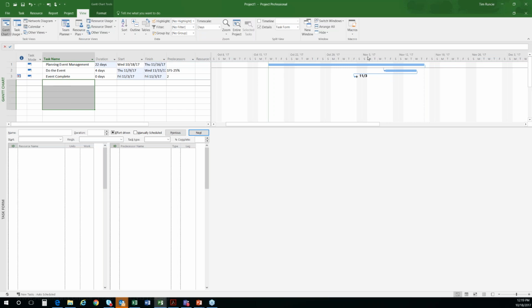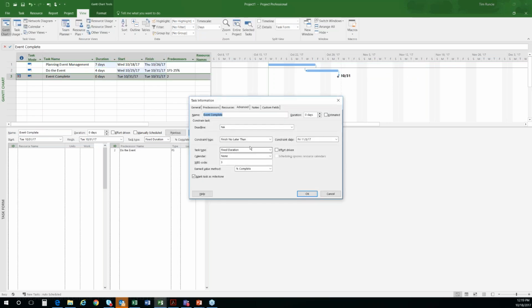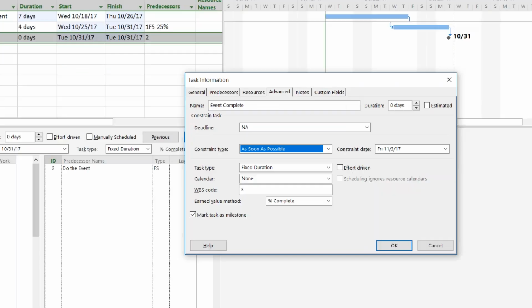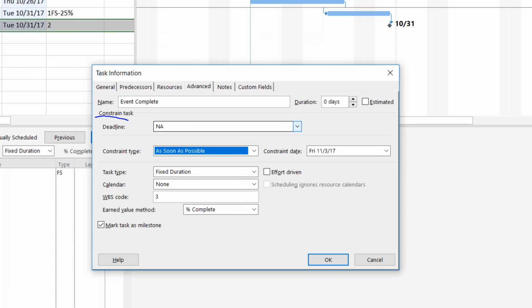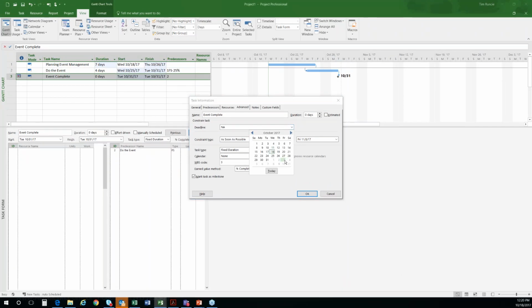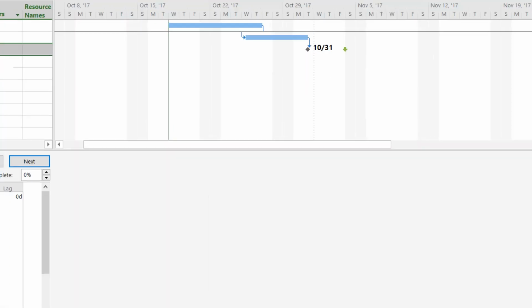So what we want to do is think in terms of the future. The idea is that, hey, listen, the future isn't set. Instead of coming in here and locking in a constraint, what we want to do is make the database do some work for us. And if you haven't seen this before, I recommend taking a look at your deadline. Let me zoom that again, that was a little fast. Zoom in on the deadline. The whole idea is I can say, I need to not miss that November 3rd date. And when I click on OK, it gives you a nice visual to say, hey, look, I can actually tell you where your deadlines are.